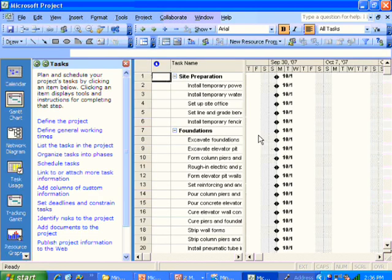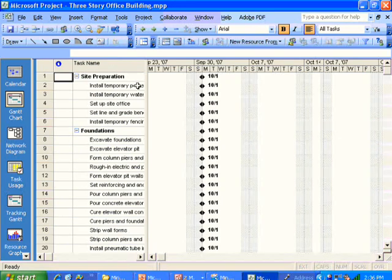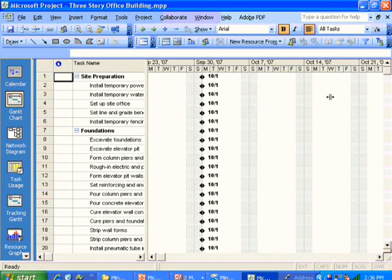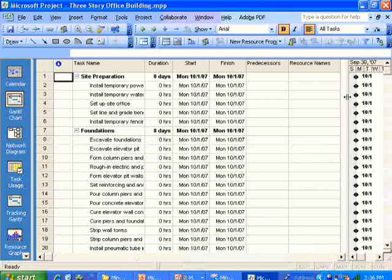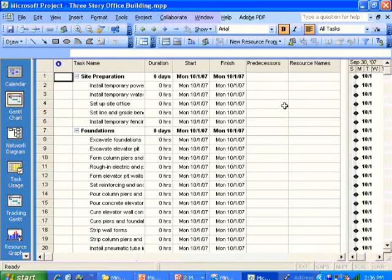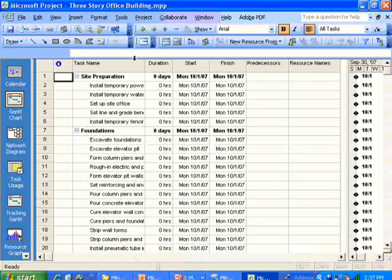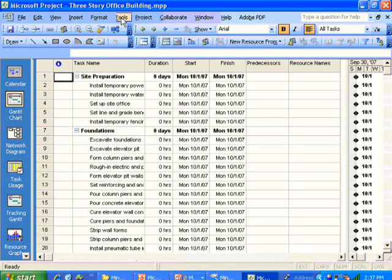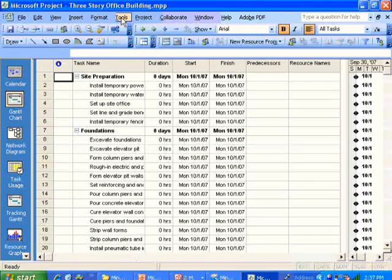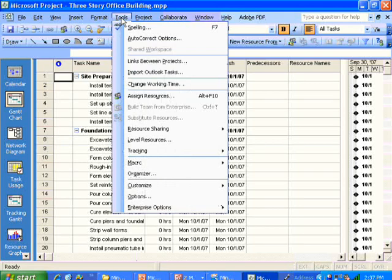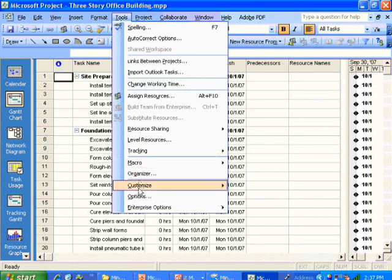And now you'll see that all the information that we entered into MindManager, the tasks, come into Microsoft Project as tasks. The WBS items come in as summary tasks.